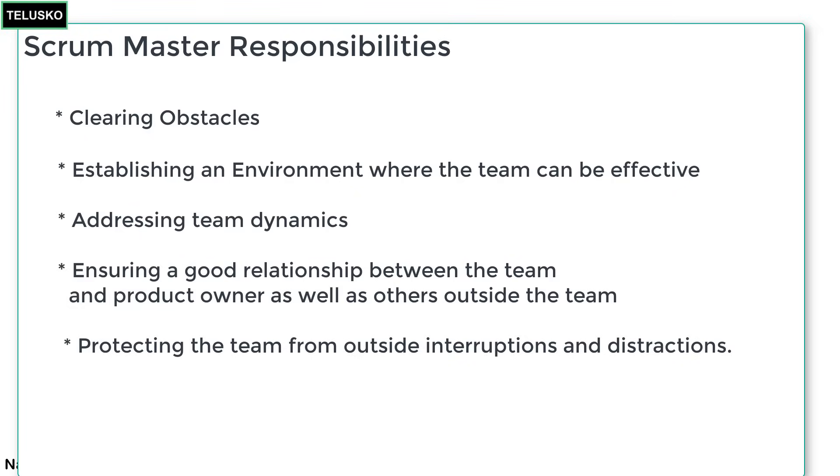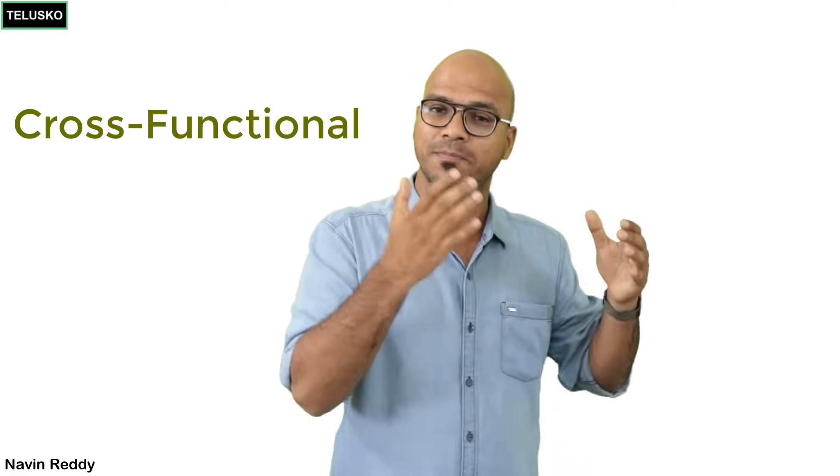The Scrum Master's tasks include clearing obstacles, establishing an environment where the team can work effectively, and preventing outside interruptions and distractions. As a developer, it takes about 30 minutes to get into the zone; an unexpected call or meeting breaks that focus and costs another 30 minutes to recover. The Scrum Master ensures there are no unnecessary distractions. The development team itself is cross-functional — every person should know everything: testing, development, design — so the team is self-organizing and not dependent on any single specialist.